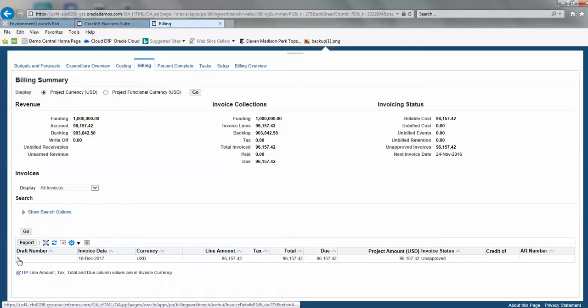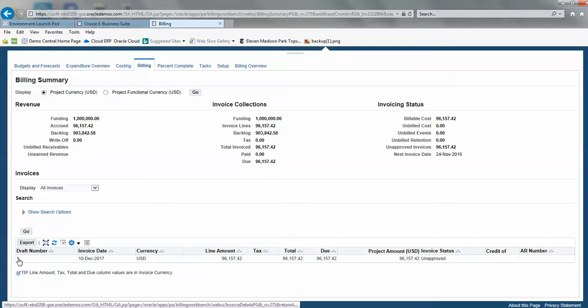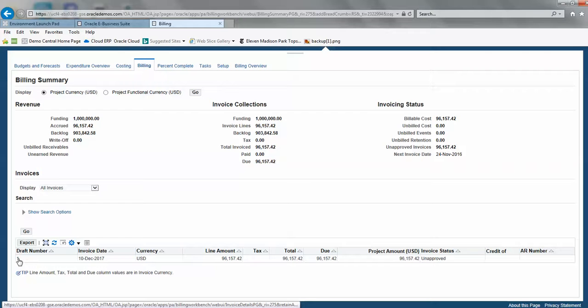They're taking funding, they're getting funding in. They're then setting up their budget. They then accumulate their costs, and those can be paid from multiple places of course, maintenance or time and labor or AP. Those costs are accumulated, they're burdened, and when they do that, apply burden rates, ultimately billed and sent to AR for collection, right?